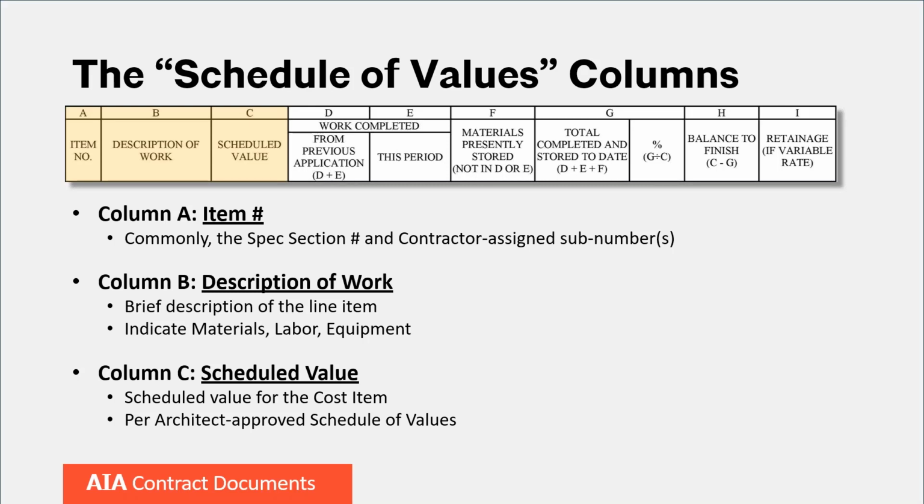In my practice, I require that the contractor schedule of values includes sufficient detail to enable my office to efficiently evaluate the completion status of the project each month. For example, drywall work should be broken down into materials, labor to hang, labor to tape and float, and labor to finish. This, in contrast to a single cost item for all drywall, allows us to quickly and accurately establish a percentage of completion of each step in the installation and finishing process, and therefore the overall amount of work completed with respect to the drywall.